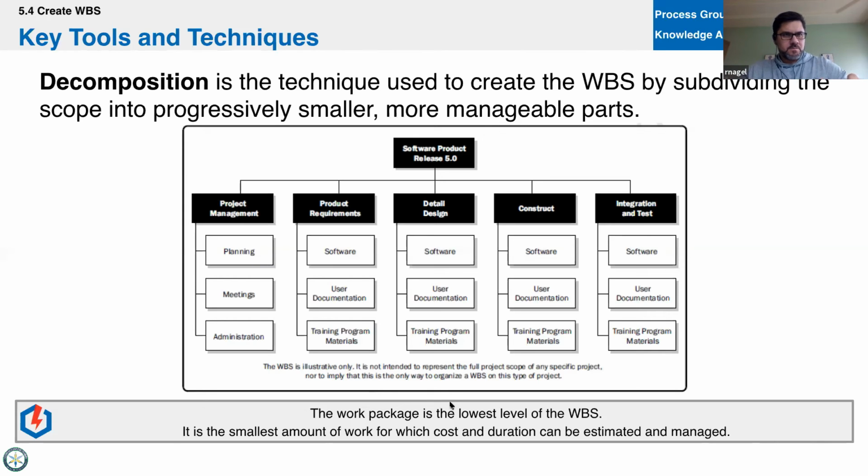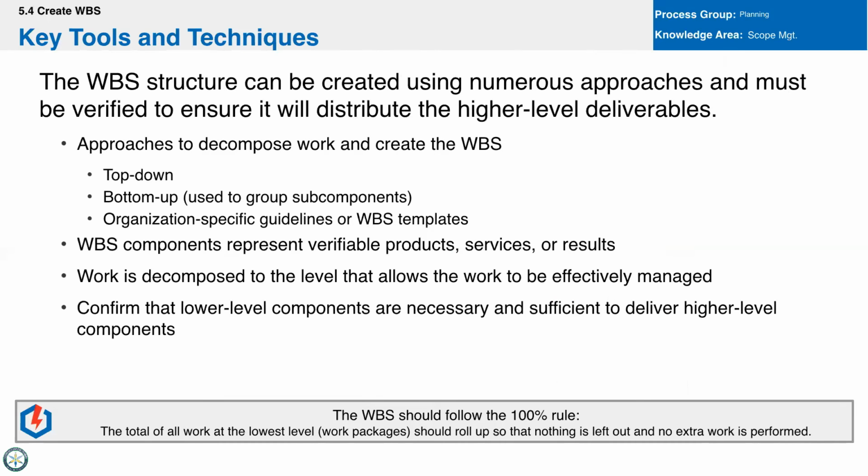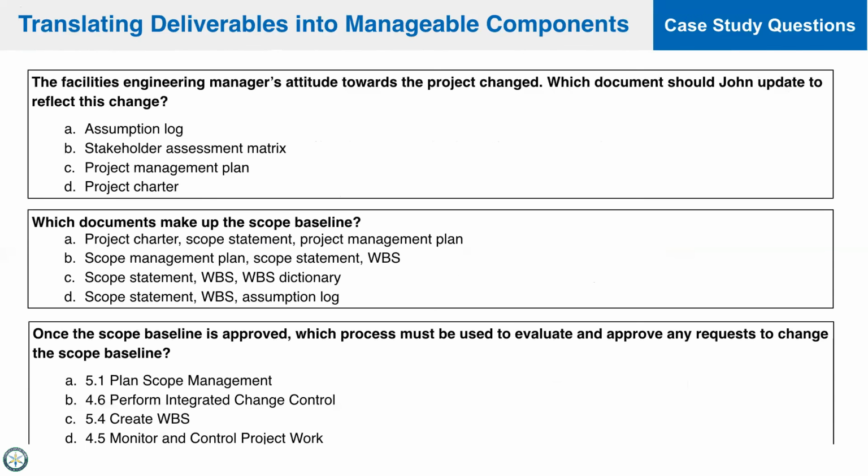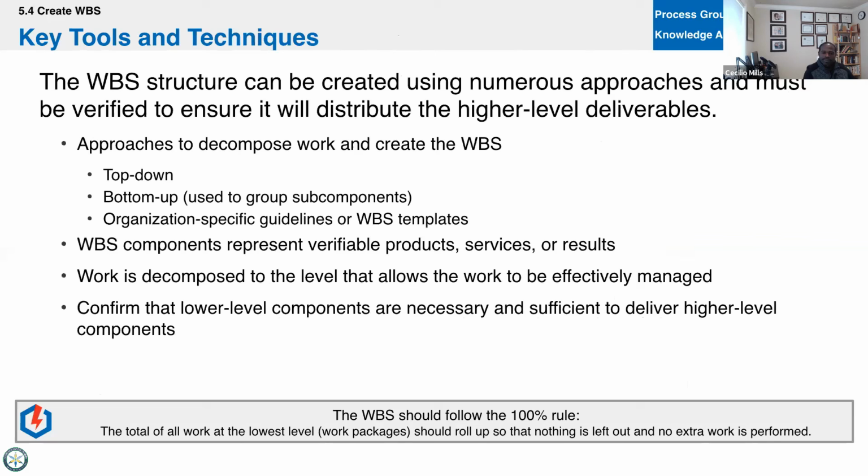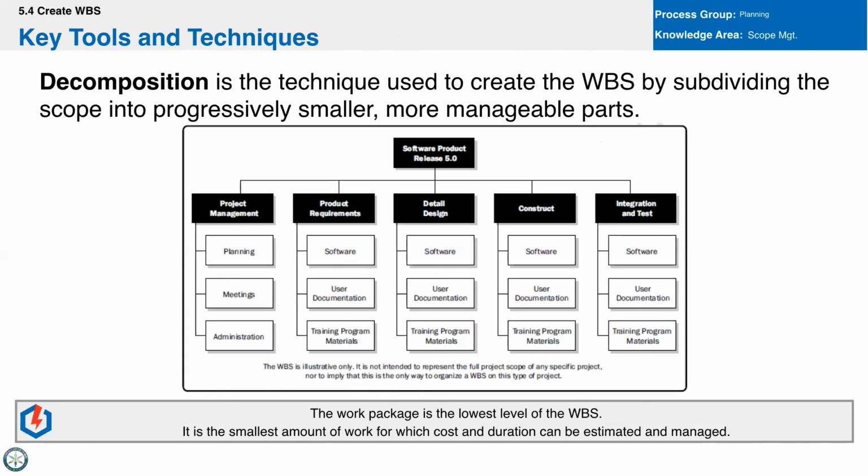You're welcome. And a more succinct way of saying that is being able to go back to the scope statement, and as you're looking at it, verify that every part of it has somehow been included in the WBS. So just to go back to that one last point, like you said, you identified there's no training in there, then theoretically one would have to go back in there and put something that would cover training. Yes.